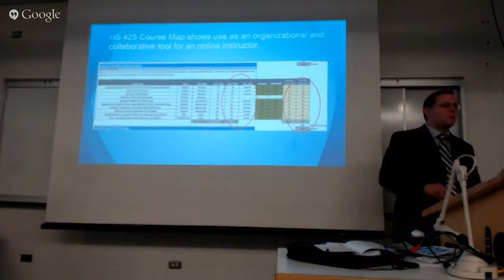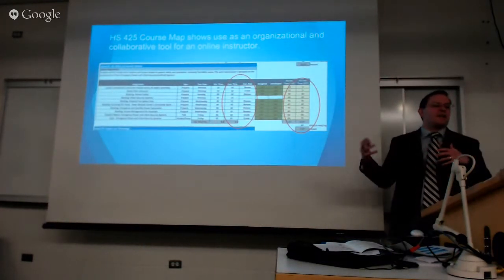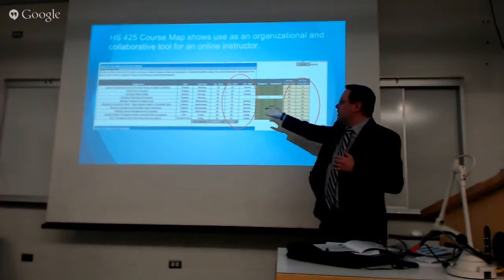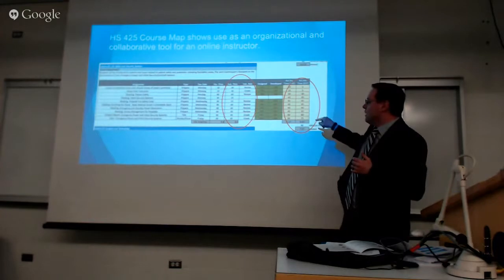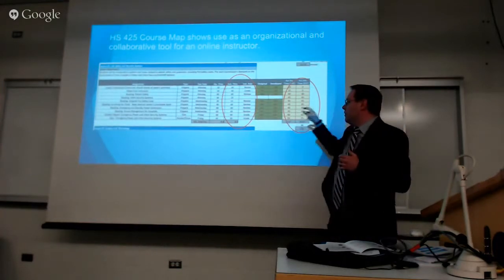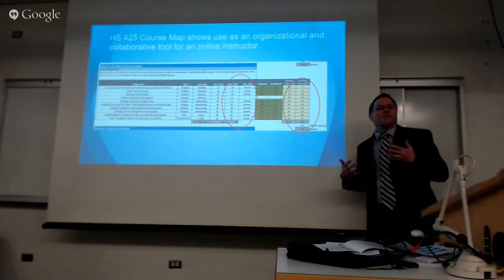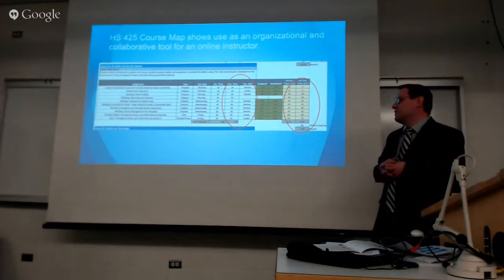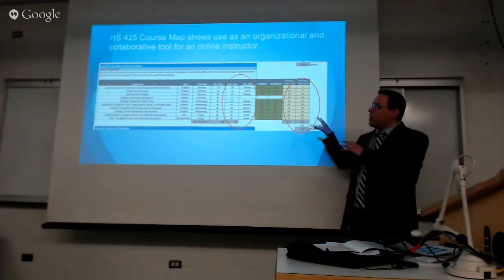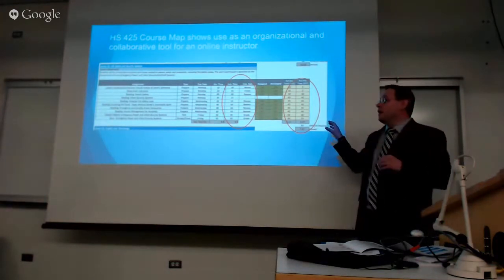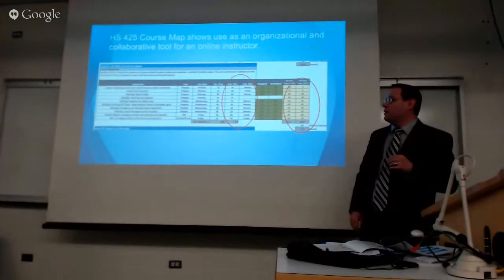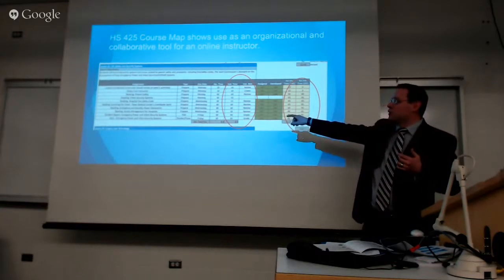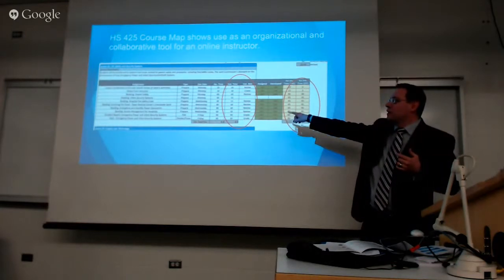Okay, so here's an example of an instructor helping us out with those estimates and looking during the pilot semester and saying, okay, here's what we estimated. Here's what you're experiencing in your course. It looks like we're a little under here. Is it just because it's the pilot? So we'd have a discussion about that. How are things going? What do we need to change? How's it feeling for you as the instructor? So that's one way we envision you as the instructors using that. We also envision it helping you get a sense for here's what's going on, here's what my students are going to be doing, and here's the role that I'm going to be playing.